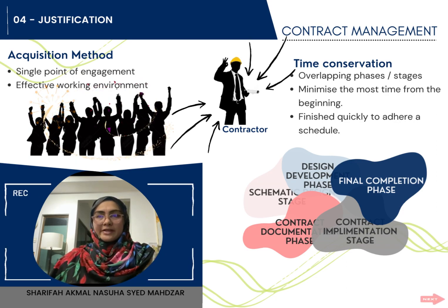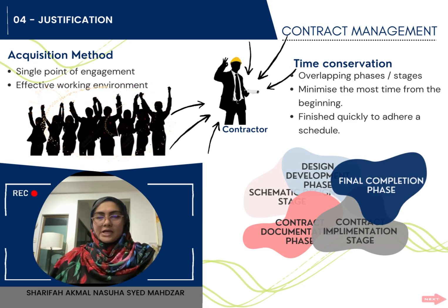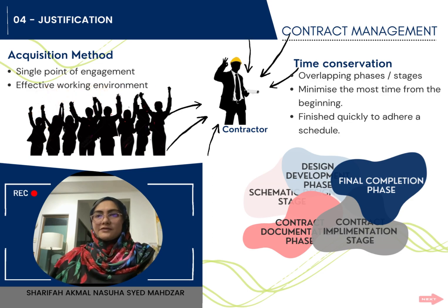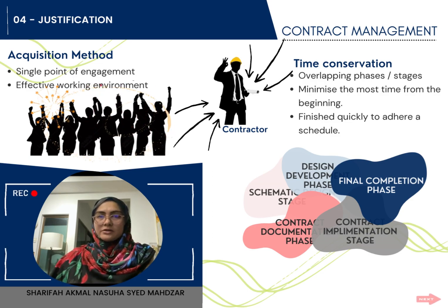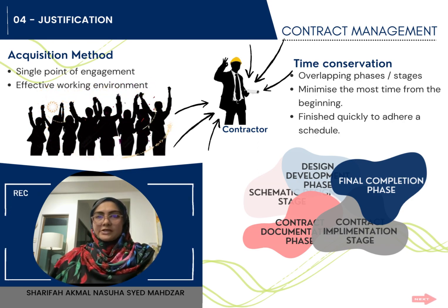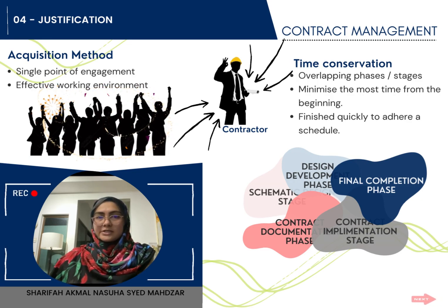In this procurement method, the main contractor is responsible for planning, designing, building, completing, supervising, testing, commissioning and maintaining the entire work, and any services or equipment in accordance with the employer's requirements or statement of need. Meanwhile, project supervision and contract management are carried out by professional consultants appointed under the main contractor.